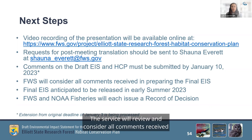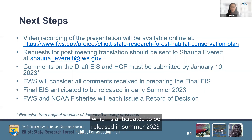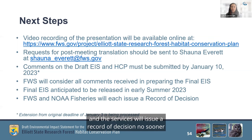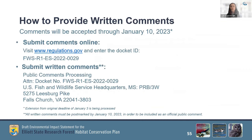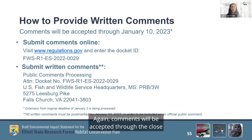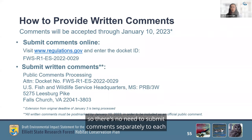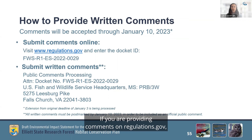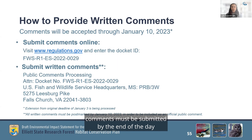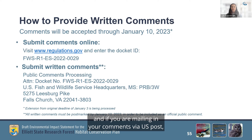Comments should be submitted via regulations.gov or by mail. The Service will review and consider all comments received on the Draft EIS and HCP in preparing the final EIS, which is anticipated to be released in summer 2023. The Services will issue a record of decision no sooner than 30 days after publication of the final EIS. Comments will be accepted through the close of the comment period, which is currently January 3rd but is being extended to January 10th. Comments will be reviewed by both Services, so there's no need to submit comments separately to each agency, and all comments are available to view at regulations.gov. If you are providing comments on regulations.gov, comments must be submitted by the end of the day on the final day of the comment period — January 10th — to be considered official comments. If you are mailing in your comments via U.S. Post, they must be postmarked no later than the last day of the comment period.